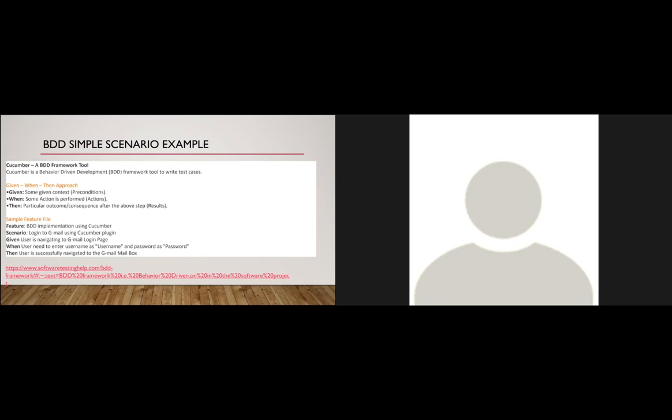And I'm going to write the acceptance criteria with some detail. So what happens is, let's say you're using Jira. What you want to do is write a paragraph or two, generally describing what it is that you want to accomplish. They don't tell you this in Agile and Scrum, but it's a really good thing so that the developers have an understanding of what it is that you're trying to accomplish, what it is that's going on behind the requirement, so they know where it is you're trying to go.